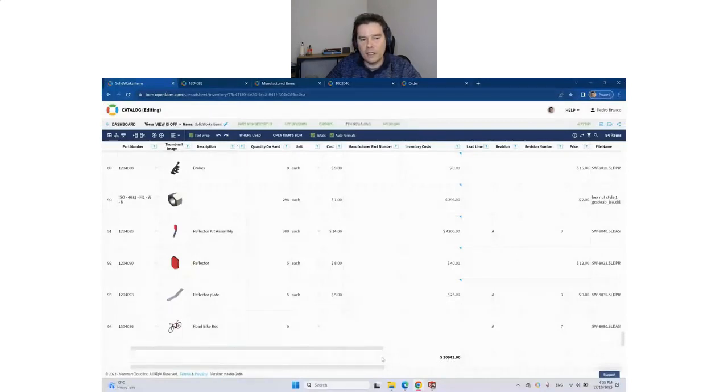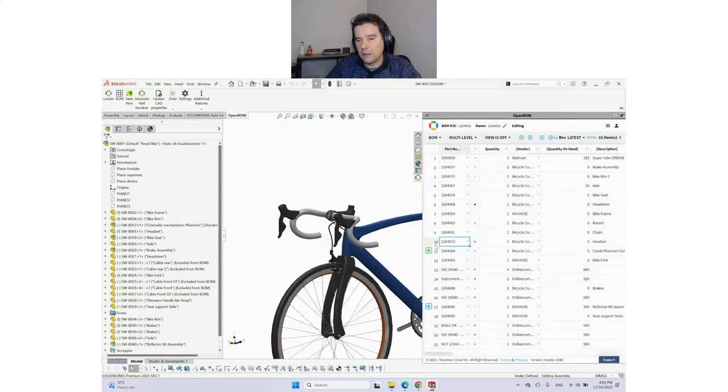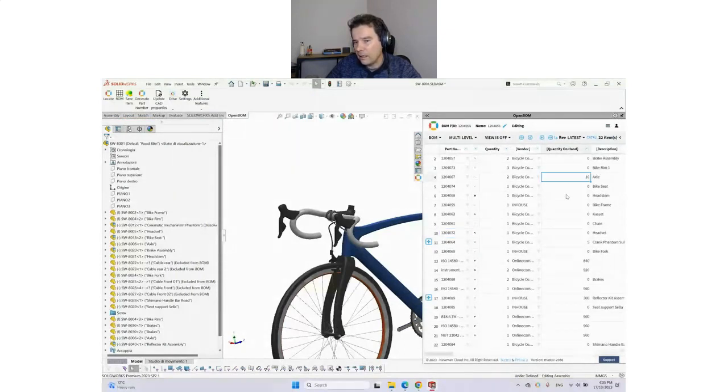Having these functions, even in CAD, you can see this information available from your engineers to everyone. Inside the CAD system, you can see the full complete bill of material. You can also see quantity on hand directly in CAD. Some of this can help you make decisions, even change management. If I'm going to change this part into a different component, and I can see that I have 300 of these in stock, I might talk to procurement to change into a new part number after this one, since you don't have so many in stock.